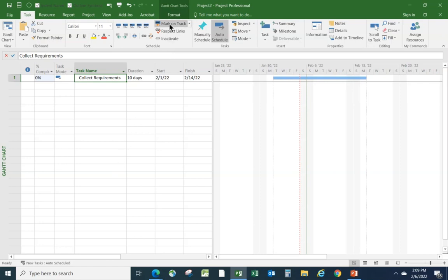While we're looking at these up here, let's set it back to 0% complete. And let's look at this thing here, mark on track. What that means is mark it as complete through to the status date. The progress is where it should be through to the status date, and Project calculates what the percent complete is for you accordingly: 40% complete if it's on track. But as always, the situation is not necessarily as straightforward as it might appear there. So let's set it back to 0 and think about what some of the alternatives might be.